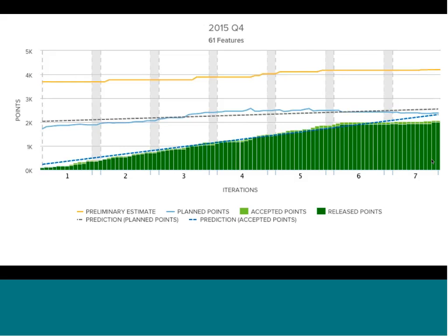So plan points in this case, and you can see the plan points with the bar down there, that's the sum of plan estimate values of stories and I believe defects in a feature of a list. It also includes any unparented stories or defects. So this value would change when a feature is added as well. Again, it gives us an idea if there's some scope change going on, if we're adding user stories to features, maybe as a way of getting them included.